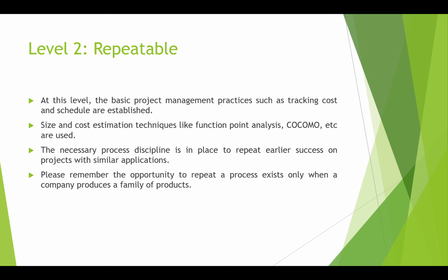For instance, if a company successfully develops a mobile banking app, they can use the same planning and estimation methods for another similar banking app. You cannot use the same estimation method for an e-commerce business. It might be different for them. Hence, the process becomes repeatable at this level. You can easily remember this level as repeatable, where you are just repeating the procedure that had been used for one app for another app. But there is a condition that these two apps or projects must have some kind of similarity.